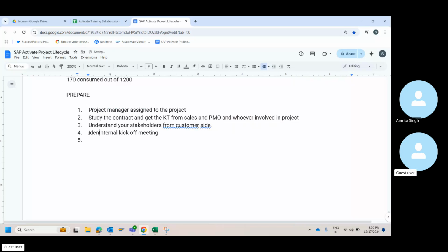Before this, the PMO and your management will say this person is your project sponsor. Your question should be who the project sponsor is. After you get a project sponsor, you will invite all the necessary stakeholders and subject matter experts, who are part of the management team, not your project team. For example, if it is HR, they will have a subject matter expert. That expert will not be part of your project, however, he'll support the consultant who is part of your project.